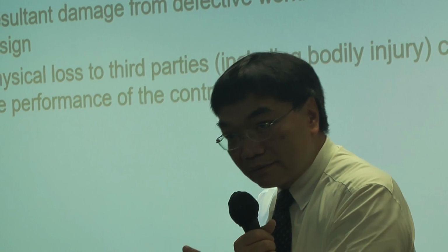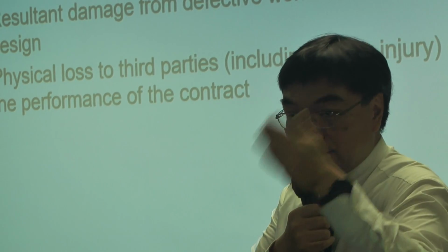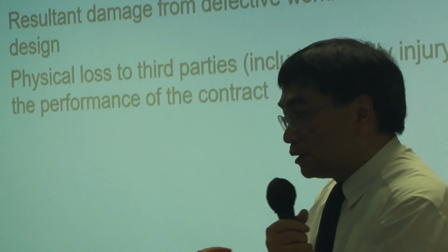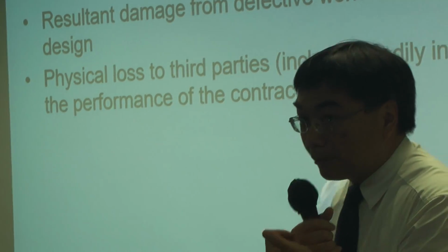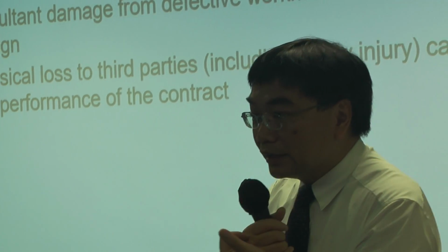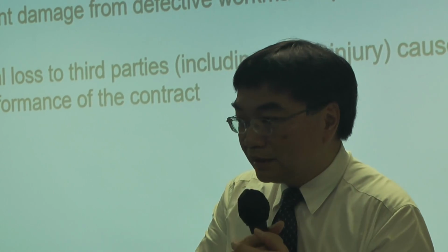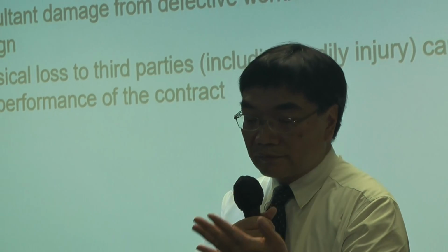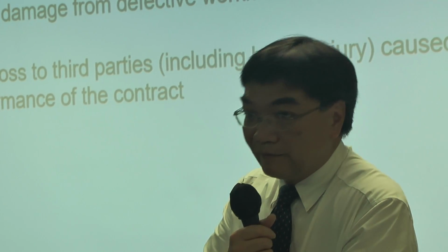Okay, the formwork collapsed. If the reinforcement has been fitted, the reinforcement bars already set, collapse of reinforcement bars, water damage, particularly to those equipment which has already been fitted. Sometimes the pump rooms, sometimes the electrical installations. Again, the assessment of losses: if there's a BQ, look at the BQ, look at the extent of damage, whether it is repairable, how much will be the repair cost.